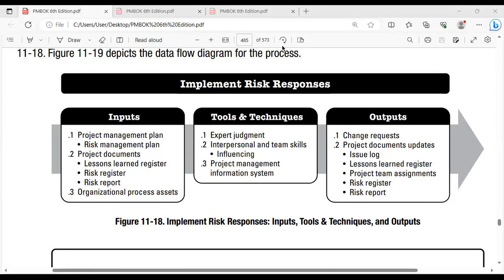You used one technique to evaluate your projects. You got 4 projects, and you selected one project. So you brought your criteria, and each and every criterion takes its own percentage share. Once you sum up all the criteria, it should be 100%. Now we bring each and every project, and you give the score for each and every criterion. Whichever project earns more score will be selected, and the sponsor will decide to do the investment.